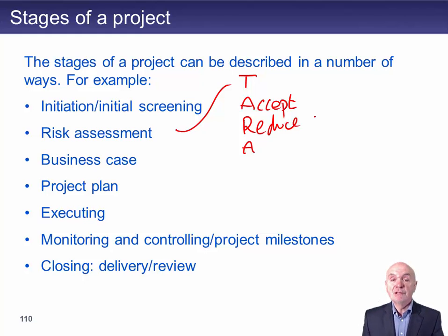A way in which you can reduce the risk is, instead of doing all 12 together, you do a pilot operation in one of them, and you get things working nicely there. You see whether or not the IT system is actually the suitable one. You perfect it there, you gain experience and expertise there, and then having it working in one, you should be able to spread it through the other 11 outlets in the organization with a much lower risk. So you reduce the risk.